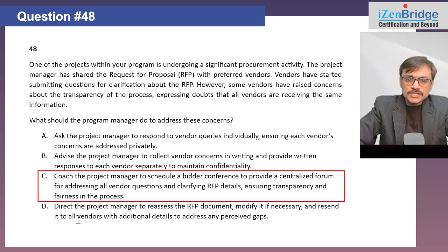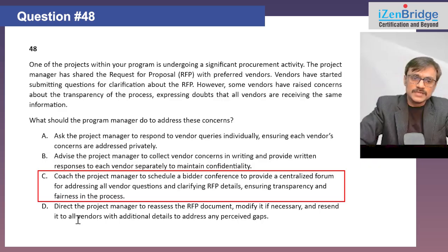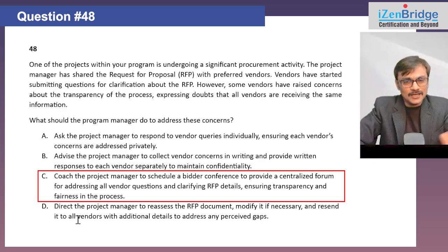Option C, coach the project manager to schedule a bidder conference. So that's the keyword we are looking for, to provide a centralized forum for addressing all vendors' questions and clarifying RFP details and ensure transparency and fairness in the process. So that's the term we were looking for. You know that bidder conference is something which is a tool. So it should be the right answer.